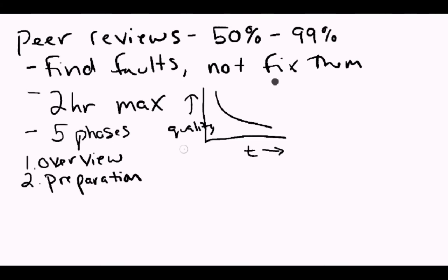So everyone, all the people in the peer review, are responsible for doing this preparation. And they should also track the time spent preparing for the review. So if you don't spend enough time, if you were so busy and you just didn't have time to fully look at the material, well, then the peer review can be delayed. Okay, so you don't want to be reading the code for the first time in the actual peer review. You want to make sure you can dedicate enough time to look at the material in advance.